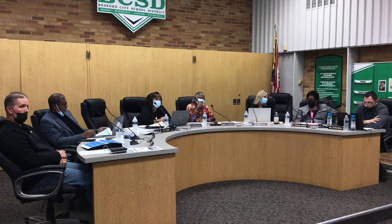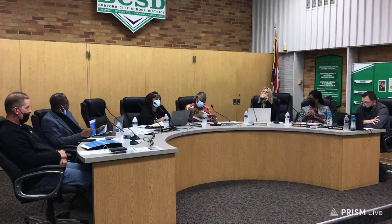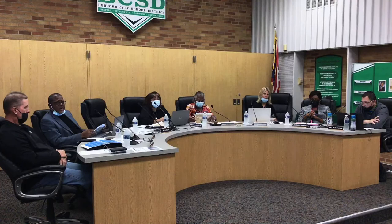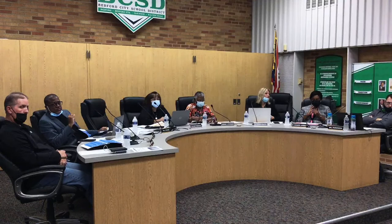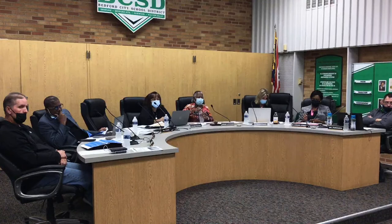So was the bleachers a part, I mean, with the bleachers, did they approve the bleachers to be changed? Yeah. We did, right? You guys have two contracts. One with White House Construction to do the floor, and a separate one for the bleacher company. The reason we did that is, honestly, it was to save money. Wayne didn't have to add a fee to handle the bleachers. They're doing it separately, so it saved you guys a lot of money.